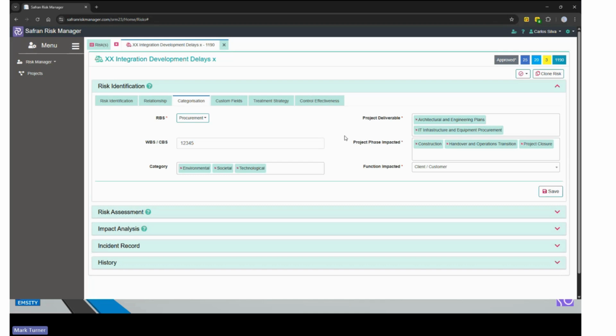So risks which are clustered at the beginning of a project, the life cycle phase of maybe design, they should be different from the risks which occur at the later stages of the project, such as the implementation or the support phase. And we can differentiate between risks which happen early and risks which happen late within the project, so that we have the best view of how to treat those risks as we move through that life cycle.